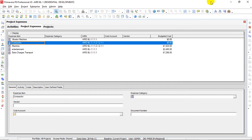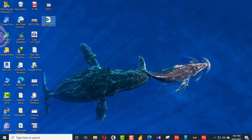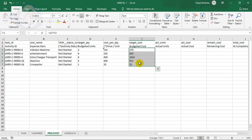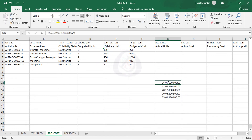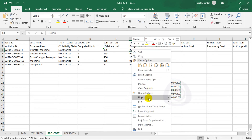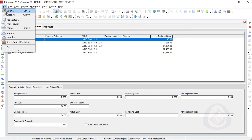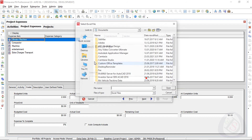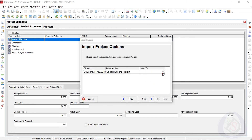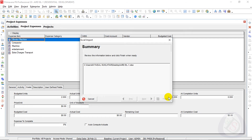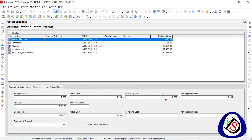The problem is a formatting issue. The budgeted cost values were entered using a formula, not as plain numbers. I fix this by pasting the values as numbers — converting the formula results to text/number format. I re-import the file: File > Import > Spreadsheet, select BL1 from the desktop. This time the import is successful — the $270 budgeted cost now appears correctly.